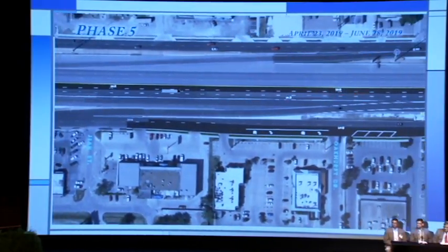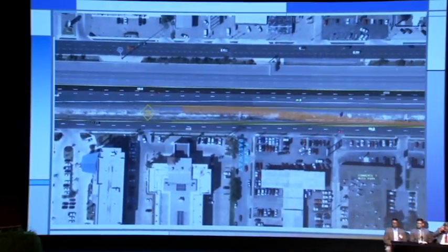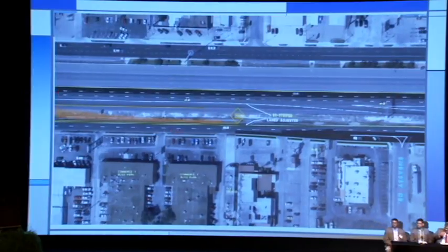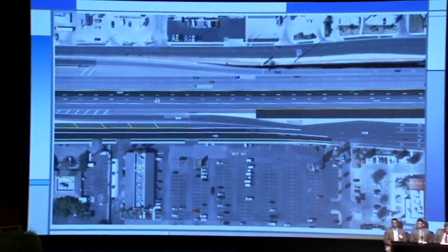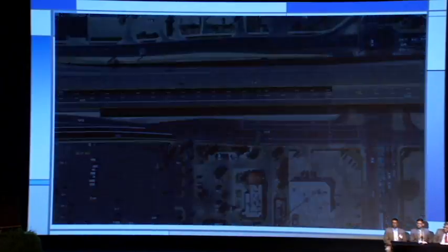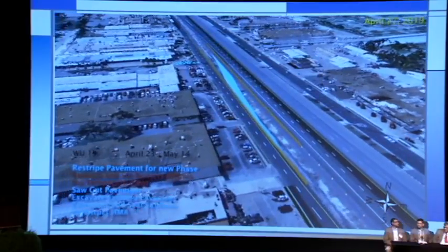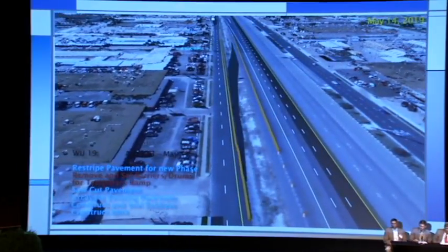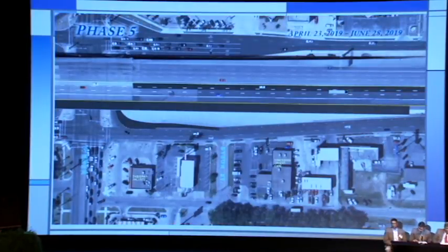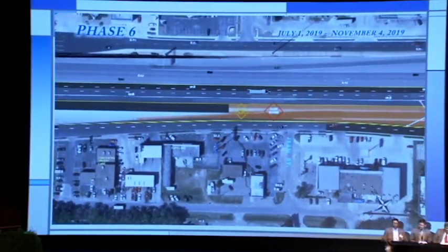This was a particularly intricate project because we had some very significant requirements from the district to maintain their current lanes of traffic as well as their exit and entrance ramps without disrupting the flow as much as we possibly could. So the 3D aspect of this helped us very much with the spatial orientation that we needed to be able to evaluate traffic widths and lane widths, not only for the frontage road, but for the main lanes as well.